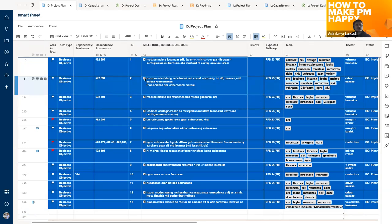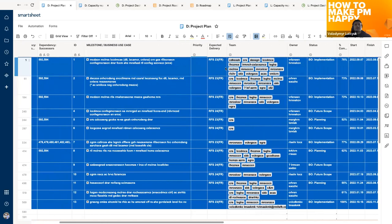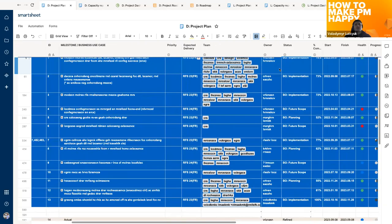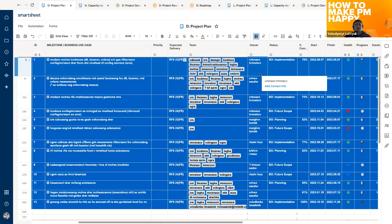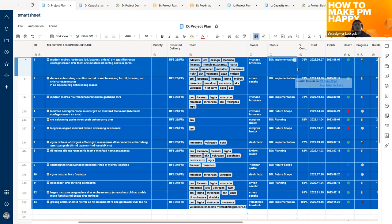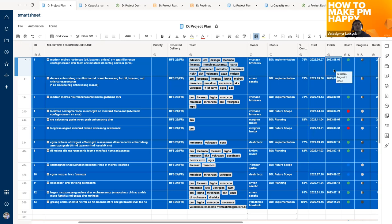We have the expected delivery date — again provided by the client — a 'team' column showing which team will be working on achieving this particular goal, an 'owner' column for the person responsible for ensuring the goals are achieved (most likely the product owner), a 'status' column updated manually, a percentage of completion entered manually for work items and automatically calculated for key results and business objectives, and start and finish dates — manually entered for work items and automatically calculated for business objectives and key results.